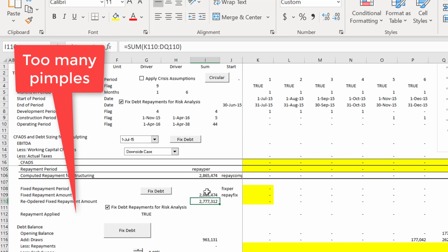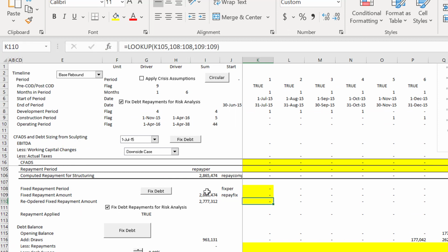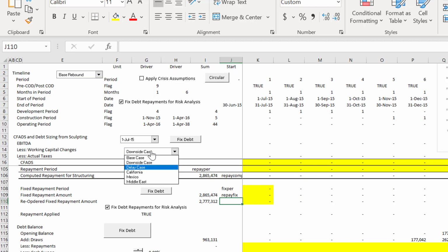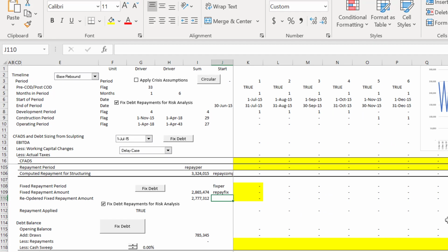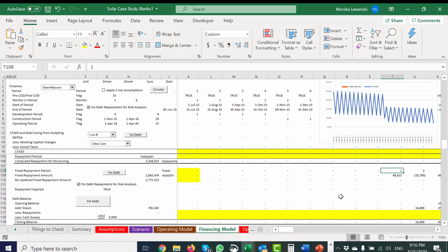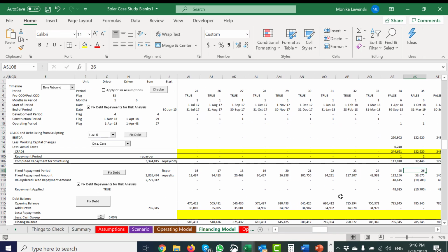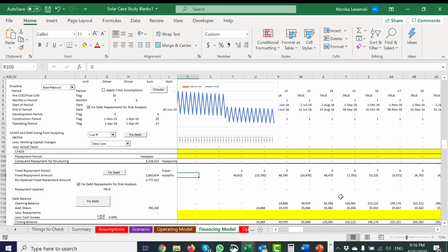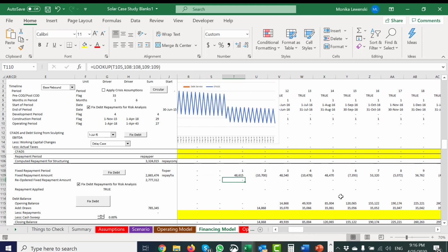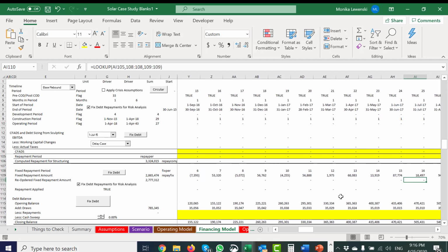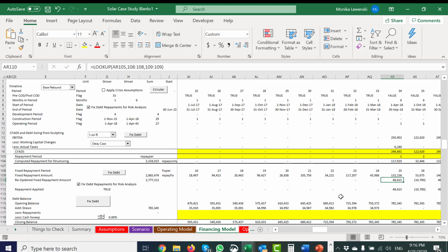And then what I do now is I say, okay, well, what happens if we have a delay case? And if we have a delay case, what happens here is that when I copied the fixed thing up here, that's all okay, but the actual amount doesn't start until this one. So what I want to do is go back over here and make a little reordered case and push it back to when the thing actually starts.